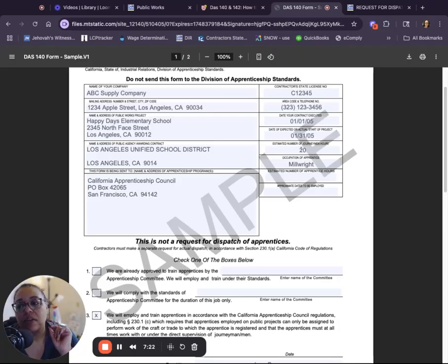Again, why the hours need to be somewhat accurate. If you put 20 hours down here, you need 20% of that. So 20 minus 20%, you need 4 hours. They're going to be like, oh, that's nice. Have a good day. They'll take your form, whatever. They're not going to send you an apprentice for 4 hours.